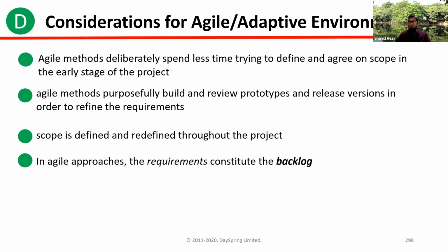And as I have already discussed, any question? Basically, if there is any change in requirement, do they have to follow the change control board and all this stuff? Will that be happening for the iterative model as well, agile model as well? Agile model is actually change driven. They are actually always open for change. So in that case, that is the implied thing. So there is no requirement for formal approval process of change control. The customer and product owner, what they feel good, they can do that. No issues. But in predictive process, after baseline, if you want to do any change, then you must get approval from the change control board. Yes. All right.